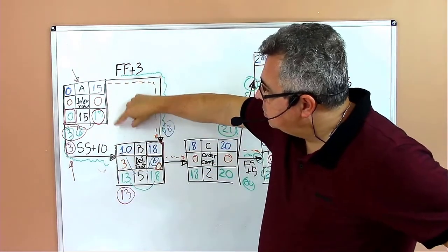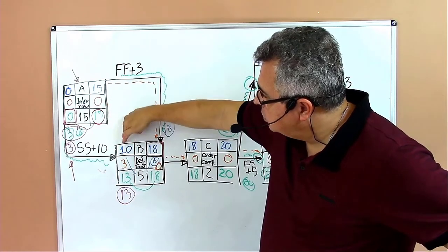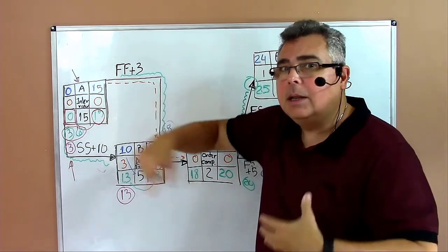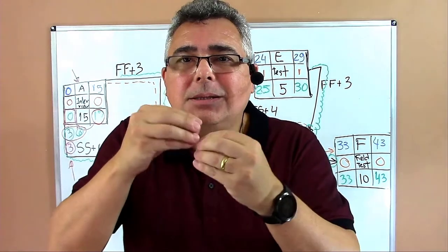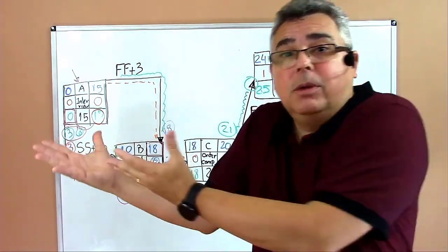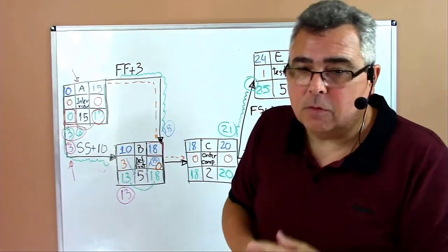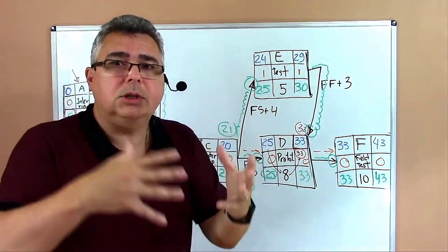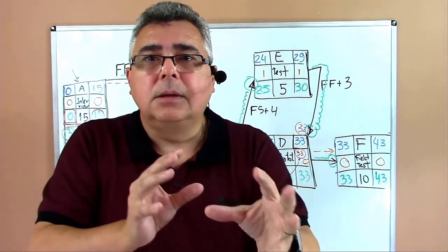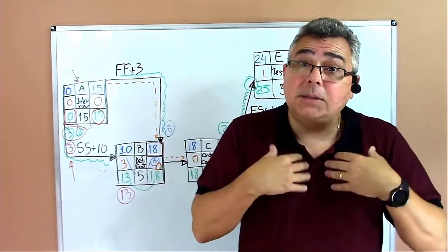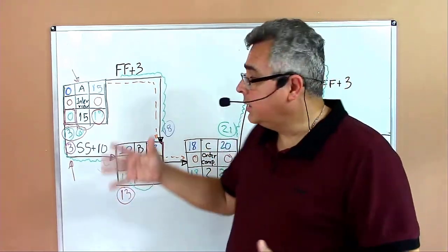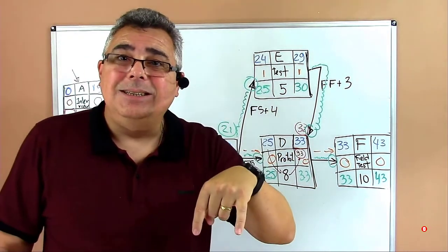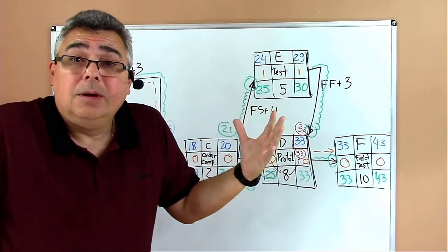So instead of using a finish to start from the interview to define features, he said, okay, I don't need to wait 15 days to start B. I can start B before that. And the project manager decided to organize the sequence using start-to-start relationship. He could have decided to use finish-to-start, but he decided that, okay? Of course, with the project team. It's a project manager decision to organize the sequence. Of course, the project manager, considering the technical aspects of each task, talking with the subject matter experts of each task. But it's the project manager that decides that with the team. So there are several ways of organizing the workflow for this project here. In this case, he decided on that configuration, but he could have decided on using another configuration.